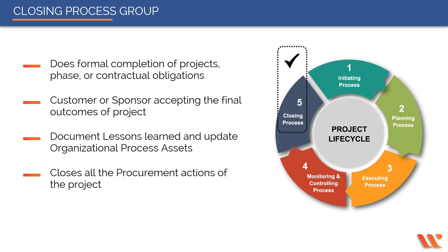How do you do that? You make the closing procedures, close open contracts, verify all product scope requirements are met, submit the final performance report, archive project records, document lessons learned, hand off final product to the customer, get approval and sign off, and release the resources back to their functional teams. Congratulations on successfully completing your project.